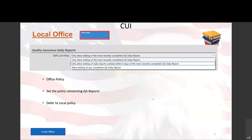One of the office policies you can set is whether quality assurance representatives can go back and change data in the past. For example, you can set a policy for this specific office allowing you to go back and change completed daily reports a certain number of days — 10, 20, or 30 days. Every contract in this office would be subject to that rule. Most districts only allow uncompleting the most recent daily report.